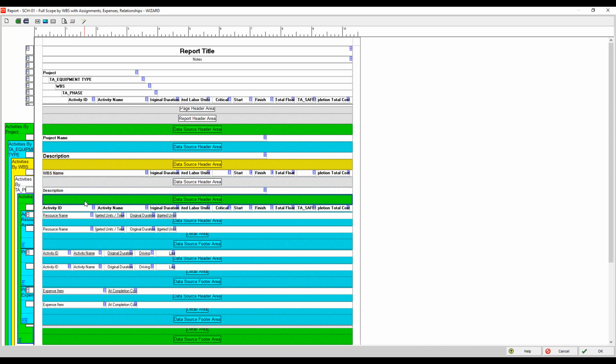And then I'm going to list the activities, and underneath each activity I'm going to have the resource assignments. I'm going to have predecessors. I've actually added successors to the final report as well, but when I ran the wizard I only selected predecessors. And project expenses. So if you're doing cost in P6 and you put an expense item on that particular job or activity, it would show up here. I'm going to take a screenshot of this just so we can reference it later.